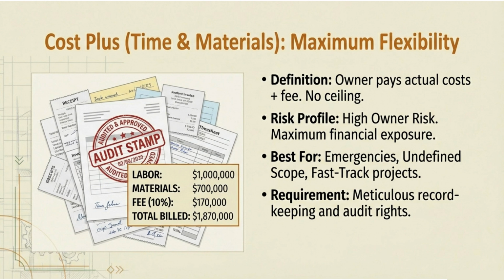Best for emergencies. The building is on fire. Fix it now. Undefined scope. We need something, but we're not sure what yet. Fast track projects. Start yesterday. Figure out details later. Requirement: meticulous record-keeping and audit rights. You need a paper trail for every single dollar.